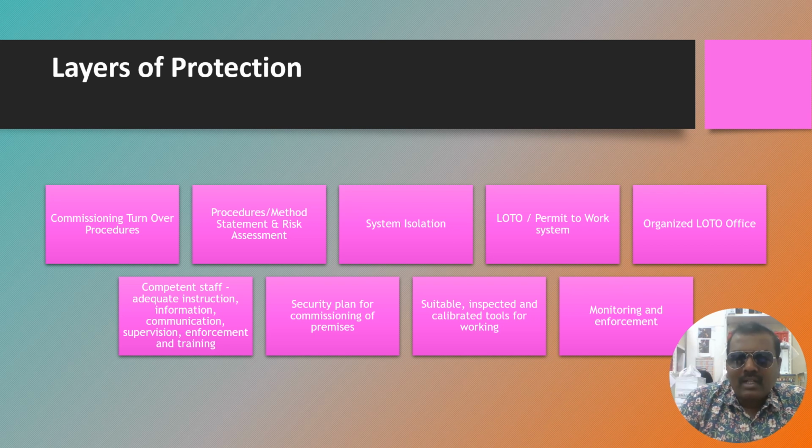downstream outgoings, right? So in that condition, before releasing the padlock from this procedure method of statement, before energizing the transformer, the downstream panels, all the outgoings, are to be under lock. Why?